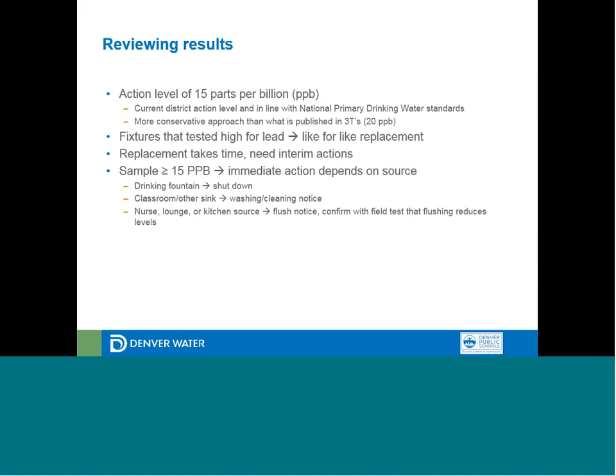We had tags with our contact information so that if any plumbing or a third-party contractor was coming to do work and they came across the fixture, they wouldn't be turning it back into service, similar to a lockout, tag-out procedure. If it was a classroom or other sink that served a function but wasn't for consumption, we would again have the FMs, the facility managers, talk with the staff and say, this is for washing and cleaning only, and we'd post